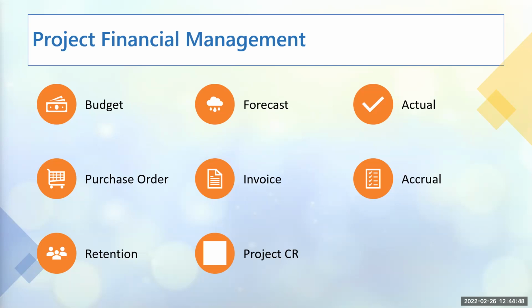They are the one buying your service. So they send you purchase orders. You send invoice to them based on the work that you have done. Or some other team, people that have worked on your project, they send invoice to you based on the work that they have done on your project. Retention is where before the work started on the project, we agreed that we are going to keep a certain percentage of the work that is done until a milestone has been achieved.